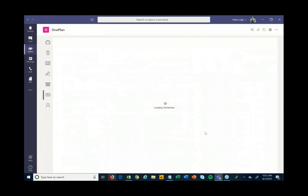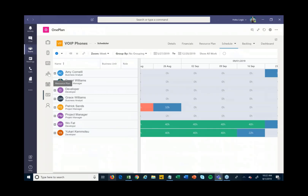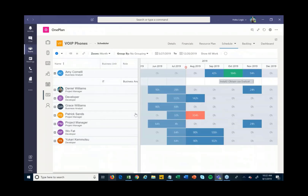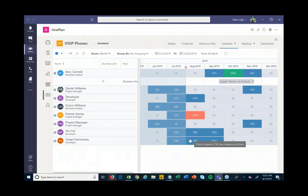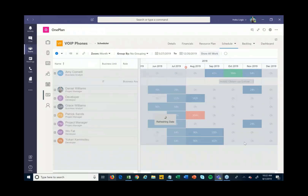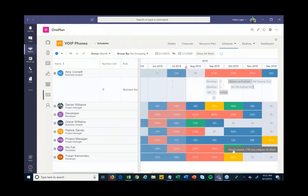I can also flip this and look at it more from a resource management perspective — which resources are working on which tasks and in which periods of time. I can look across all that and see who's overloaded and who's not. Right now I'm just looking at this particular project, but if I hit the 'Show All Work' button it's actually going to go across all of the different projects that have been published into OnePlan and Teams.